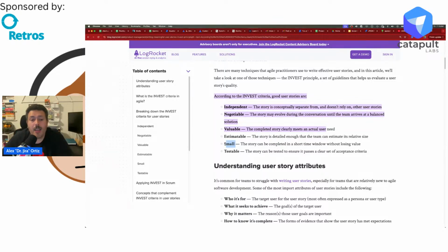But you've got to think much, much smaller, because all of those steps have to be done in 2 weeks for multiple stories. And so your team is going to be stretched very thin. So now you want to think as small as humanly possible so that you can increase your chances of success with respect to all the different things that need to happen, without losing value, without rolling over to the next sprint.